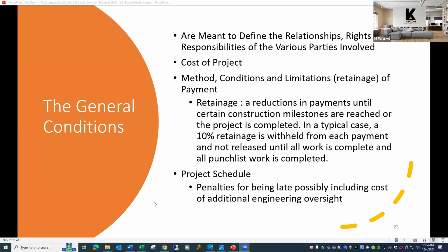So typically with HOA type projects, there is not a very concrete schedule or any penalties for going over. And again, they're typically very weather dependent. If you're doing roofing or pavement, it depends on the time of year, the temperature, whether it's rained for 2 weeks straight. There are many factors involved that can limit the contractor's progress.